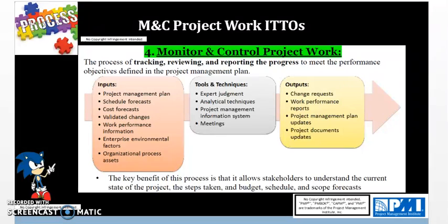Reserve analysis is where we're taking in the contingency reserves, and typically a company will give you 10 to 15% above the cost estimate by the program manager or above. So we need to reserve money and make sure that we are not bleeding too much money so we don't tap into the reserves. The last resort is to touch the contingency reserve since we have accepted the risk. Keep in mind, the contingency reserve is for known risks, whereas management reserves are outside of the cost baseline and are for unknown risks. That is outside of the baseline.